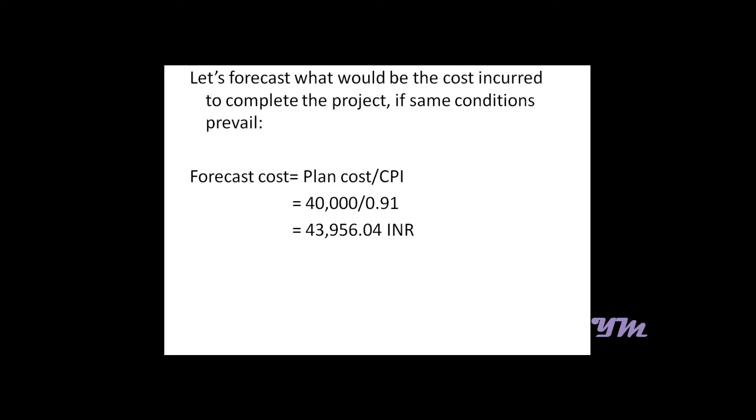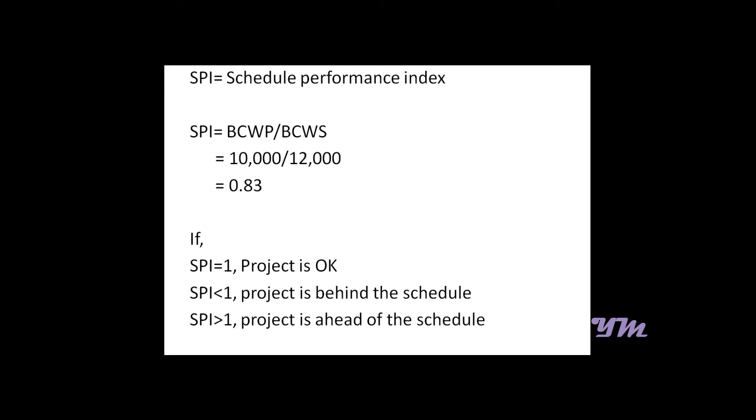We have another index known as Schedule Performance Index, which gives us details about the schedule. According to the formula, SPI equals BCWP by BCWS, that is 10,000 by 12,000, which comes out approximately to 0.83. Similarly, if it equals 1 it is OK, if less than 1 it's behind schedule, and if greater than 1 it's ahead of schedule. Here it's behind schedule.